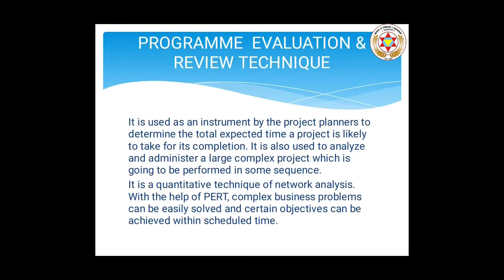Program Evaluation and Review Technique (PERT) is used as an instrument by project planners to determine the total expected time a project is likely to take for its completion. It is also used to analyze and administer large complex projects performed in sequence. It is a quantitative technique of network analysis. With the help of PERT, complex business problems can be easily solved and certain objectives can be achieved within scheduled time, also known as contractual time.